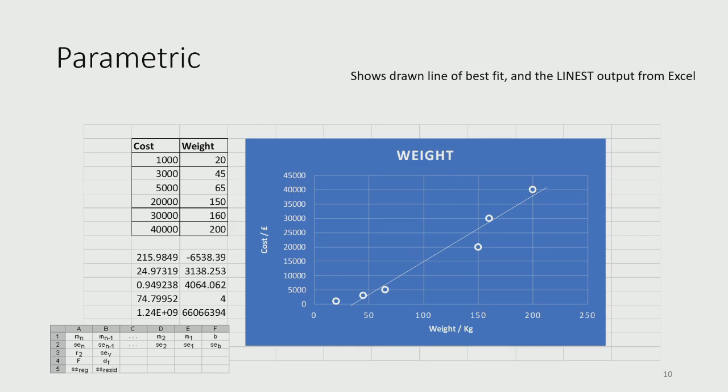But essentially, what you would do for a parametric is collect more data than just one, as in your analogy. And this is where your normalization is important, because you want this data to be as comparable as possible. So if all these were aircraft, then you want a comparable set of aircraft. You want them all to be civil airliners. You don't want any fighter aircraft in there or something like that, because they're completely different in terms of complexity and technology and all sorts of things. So you want as homogeneous a data set as possible. You want all the data adjusted to be in the same year. Similar complexity, maybe similar purpose, because the more comparable your data, the better your estimate.